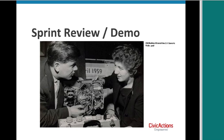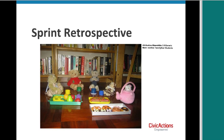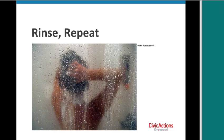Also at the end of the sprint, the team gets together and talks about how their work went — usually just the team, to have a safe space for honest evaluation. A common format is: what went well during the sprint, what didn't go as well, and what would we like to try differently next time? Then you do it all again — deliver your potentially shippable product, go back to the product backlog, take the highest-prioritized items off the top of the list, and repeat the whole process.